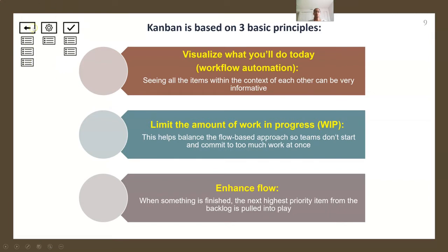Here in this picture, you can see just a miniature illustration of how a Kanban board would look. So in the leftmost column, you can see that these are the tasks to do. This is in progress, and the final column is done. So whenever a new user story has to be pulled, it would be pulled from the to-do list. If a task is in progress, have a limited number of work in progress, that is, limit the amount of work in progress.